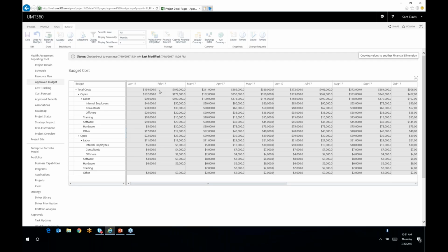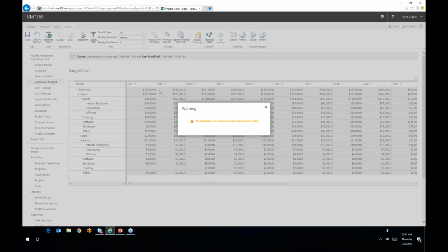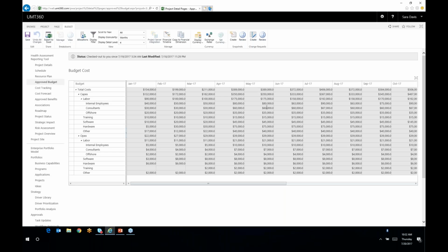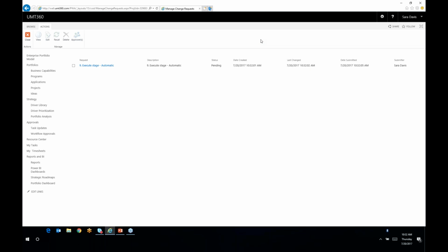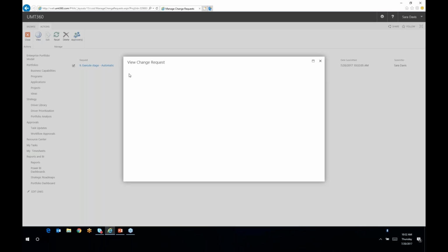So as a PM, I'm going to say, look, my forecast is higher. Now, we could have negative change requests too, but in this case, my forecast is higher. I'm going to overwrite my budget, but the tool says no chance because that budget is locked, so we're going to raise the change request on your behalf. So we're leveraging a template here. If we look here in the change request log, a new change request has been posted. I can see the request is there. It's been routed for approval, so I can see who the approvers are. I can drill down, learn more about that change control or that change request, and see the updated values.